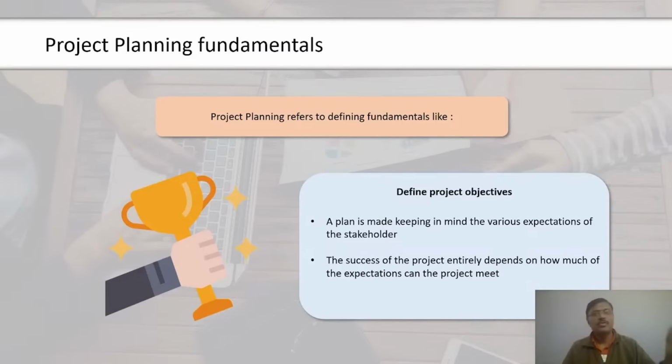The value of the next two parameters, cost performance index, CPI, and schedule performance index, SPI, values vary between 0 and 1. For example, a CPI of 0.8 implies that 80 cents of work is paid for every dollar spent in the project. Similarly, if SPI is 0.9, it implies that the project is progressing at only 90% of the speed originally planned. The next parameter is estimate at completion, or EAC.